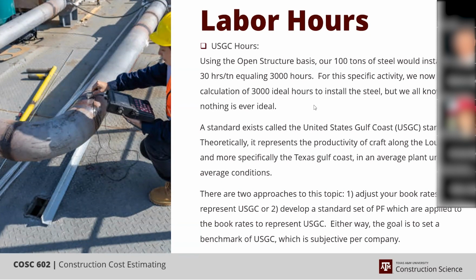So if you know that you're still sitting on the old Page and Nation costs or hours, you need to bring them up to current to reflect the safety, and then you need to bring them up to what you understand your Gulf Coast to be.